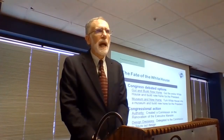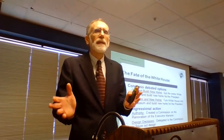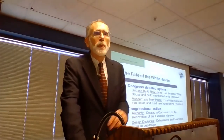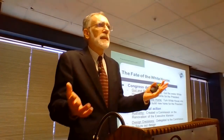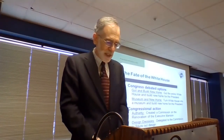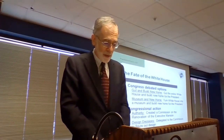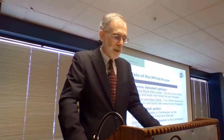So what's going to happen to the White House? Congress debated the options about what to do. They thought, well, we could gut the building totally and then just build a new home for the president. Or maybe take the White House, turn it into a museum, and build a new home for the president someplace else. So they punted on this pretty significant decision. They created a commission for the renovation of the executive mansion, and they delegated to the commission the decision on what to do with the White House. They appropriated $5.4 million before they even knew what the program was for dealing with the White House.